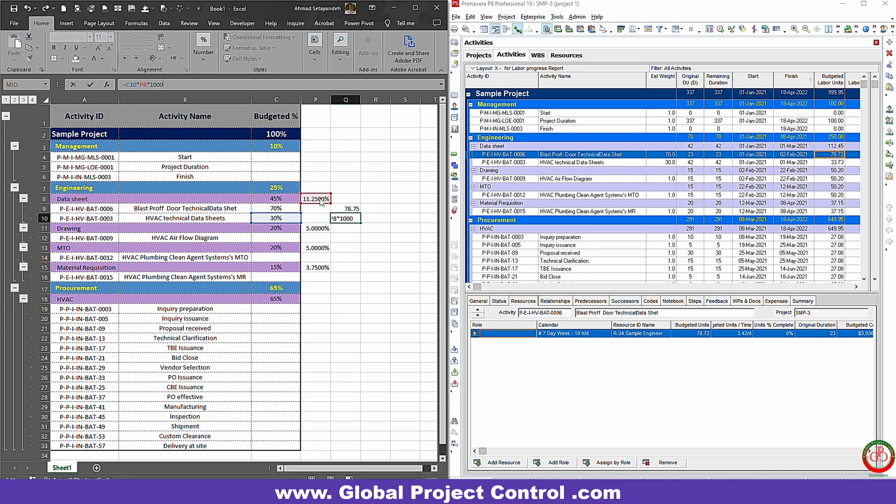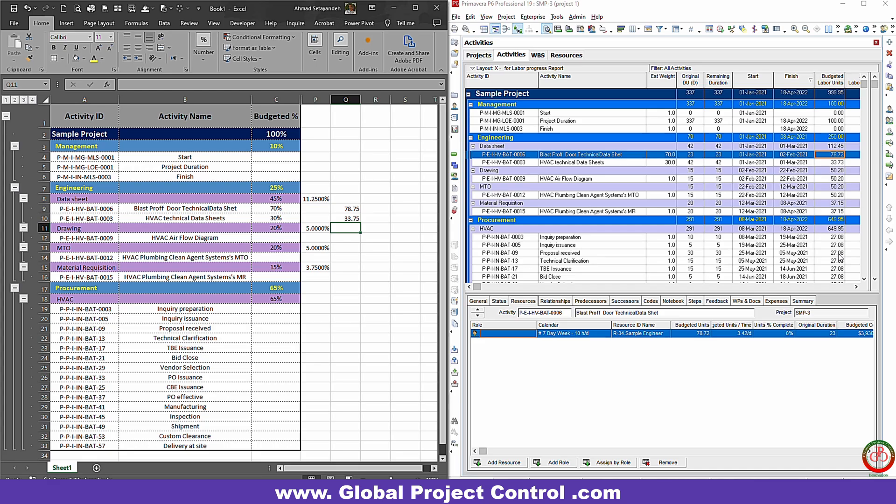You can use this method when you have the information on the WBS level but you try to assign it to the activities. That's very helpful and you can accelerate the process like what I showed you. Some decimals, for sure, need to be fixed after importing the information. Hope you like it.